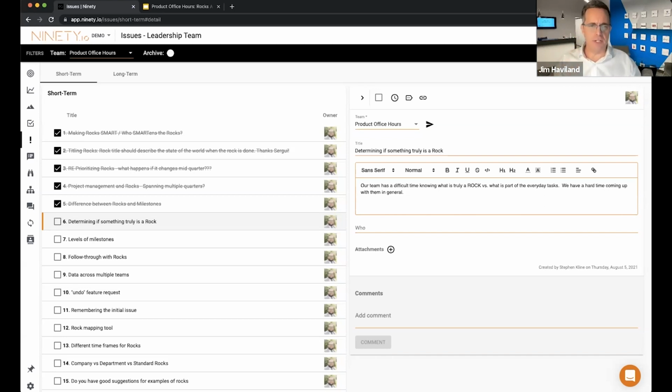Like what Christine was talking about, where, hey, I'm running a sales team. We already have a set of sales goals for the quarter. Achieving the sales goals isn't a rock, but improving the onboarding of new clients so that we actually capture more revenue in that first quarter, that's a great rock. Let's make that part more successful. That'll have an impact on my ability to achieve my sales goals.